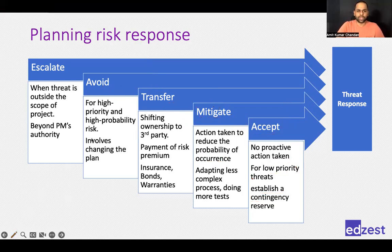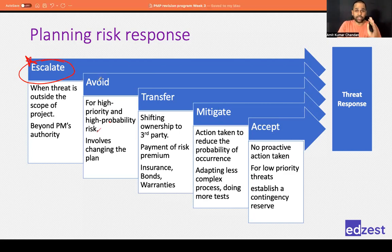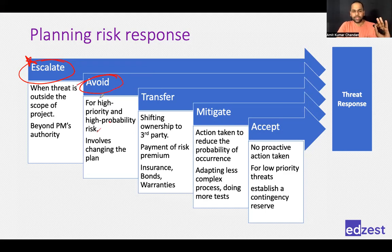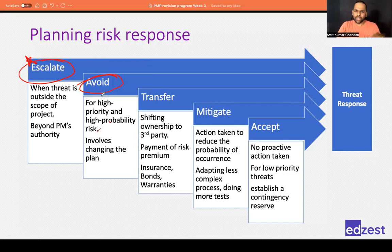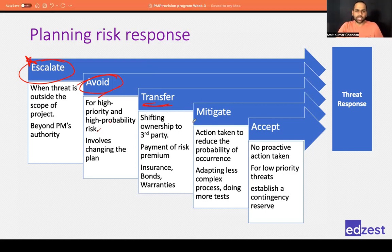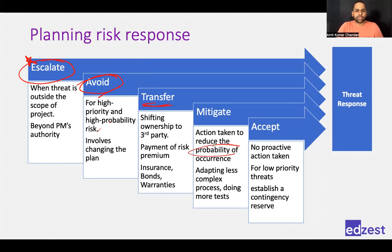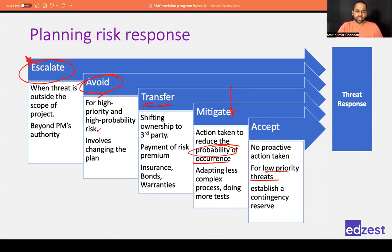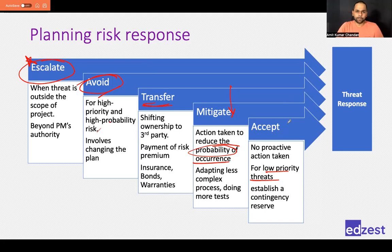So there are five risk responses. If the risk is beyond your authority, escalate. If it is high-probability — 80–90% chance of happening — try to avoid the event itself. If you cannot avoid, transfer it to somebody else by buying insurance or finding someone willing to take that risk. For most risks, the maximum you can do is reduce the probability — that is mitigate. For low-priority risks with little probability and little impact, accept them and keep a contingency reserve.